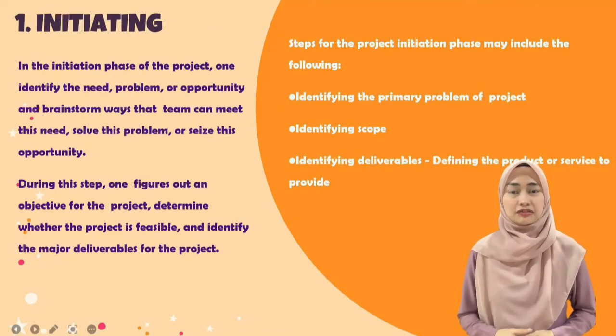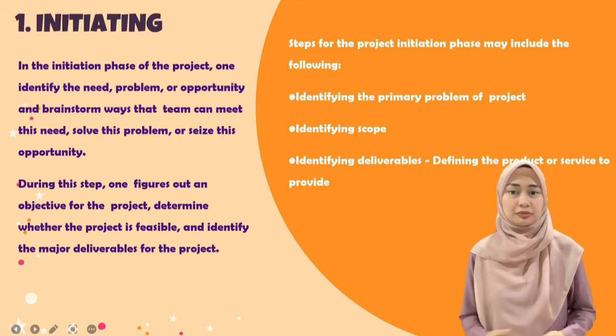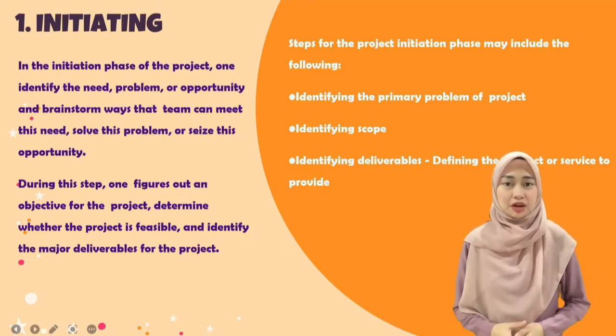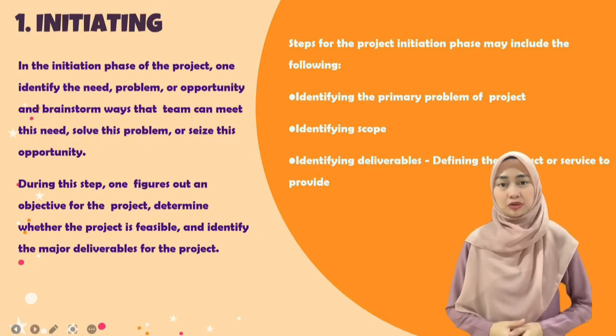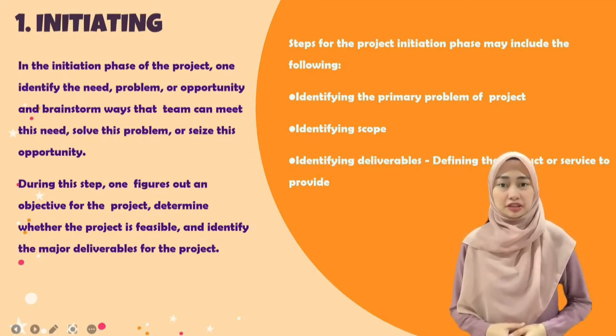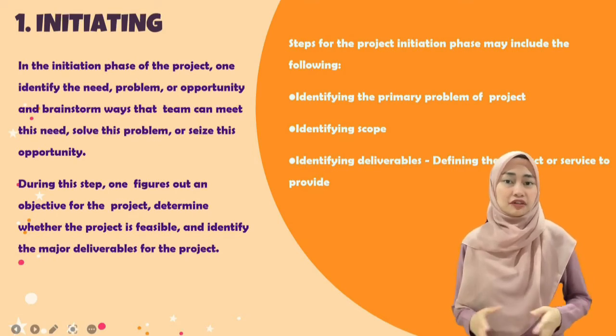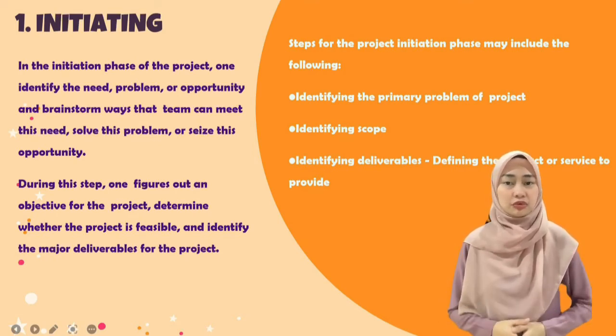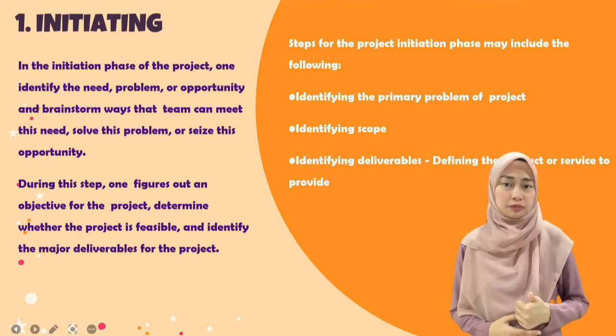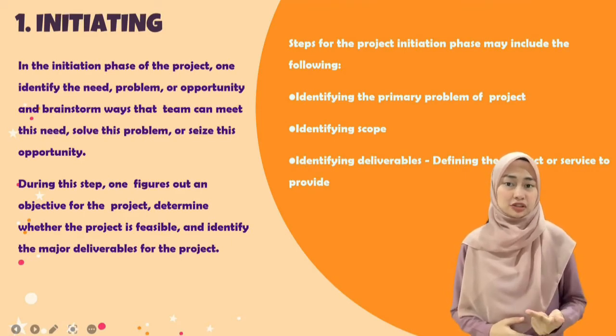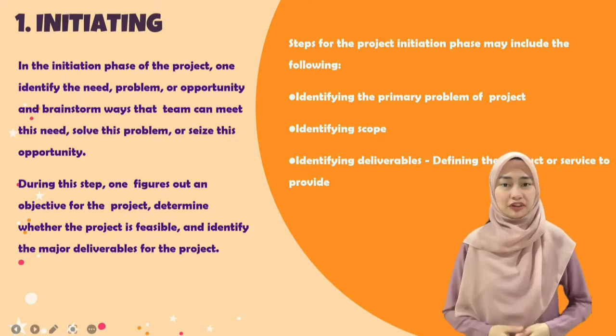In the initiation phase of the project, one identifies the need, problem, or opportunity and brainstorms ways the team can meet this need, solve this problem, or seize the opportunity. During this step, one figures out an objective for the project, determines whether the project is feasible, and identifies the major deliverables for the project. Steps for the project initiation phase may include the following: identifying the primary problem of the project, identifying scope, identifying deliverables, which is defining the product or service to provide.